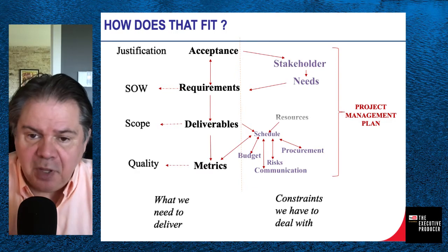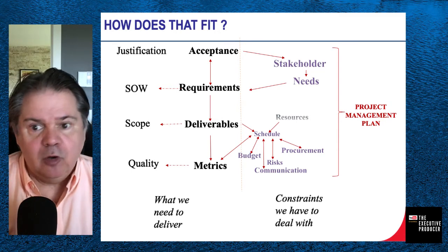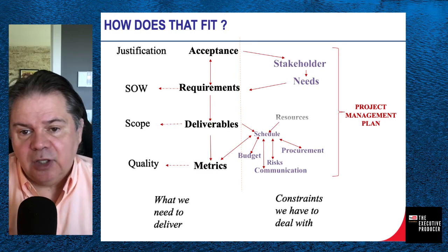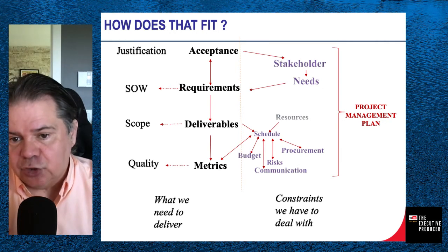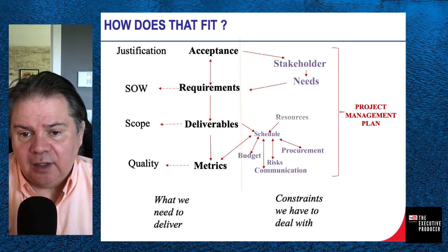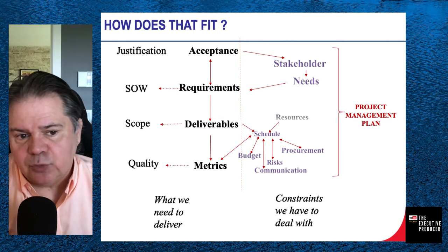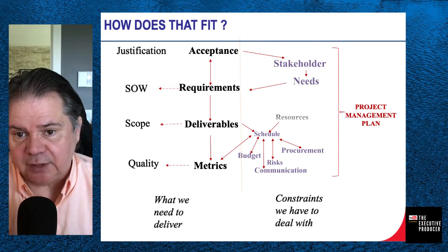Resources could be people, equipment, material, a truck, a location, so many things. So we allocate resources. These resources cost money. So in our schedule, we will be able to establish effort to do the work and duration to do the work. With these two things, we can also add a calendar under it and get a full schedule. The sum of all these resources will be brought into the budget.